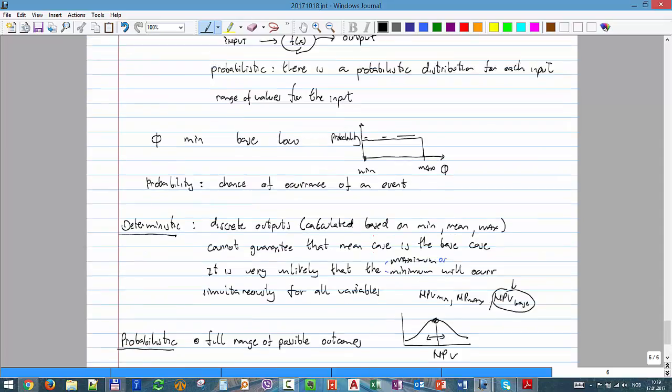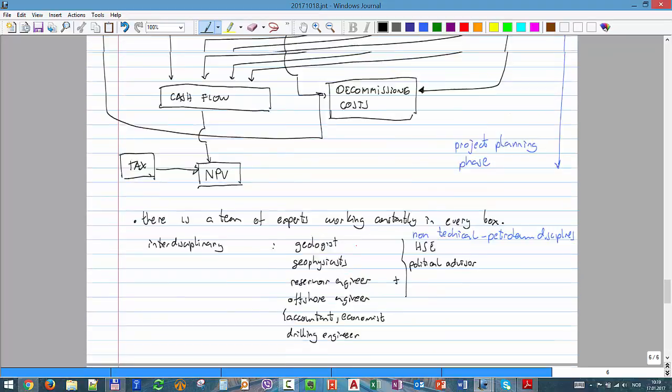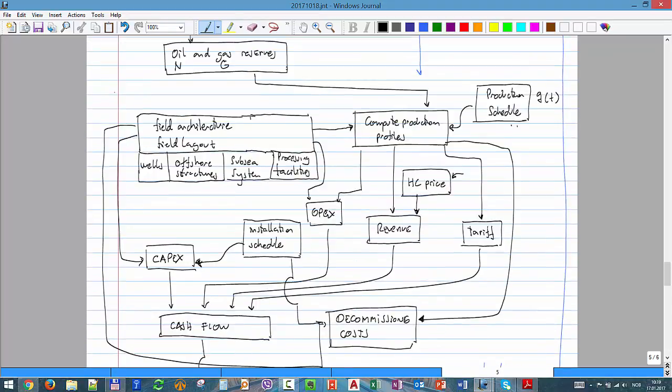Remember that, depending on the phase, you sometimes don't have just one architecture, but you might have 3 or 4. You might have different options. So you have a value chain with certain options in each box, and then as you go down in the decision process, you select one, and that box will have only one.